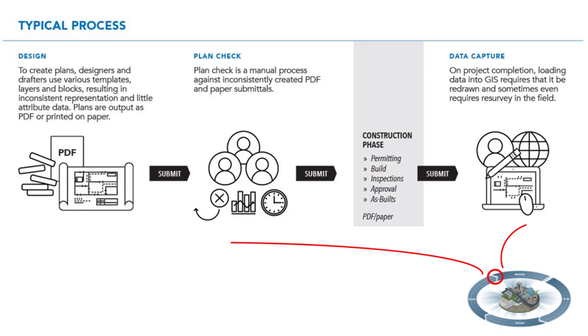The focus is on that spot in the lifecycle — the handover of data from construction documents to GIS and asset management groups. There's design turning into construction drawings, plan check whether manual or digital, and construction where even 3D designs are often pushed back to 2D. That as-constructed data then becomes foundational for the next hundred years of planning, maintenance, and operations. In AEC and buildings they're way ahead — building handover comes with a model containing all assets and attributes — but on the GIS side we're not quite there yet.